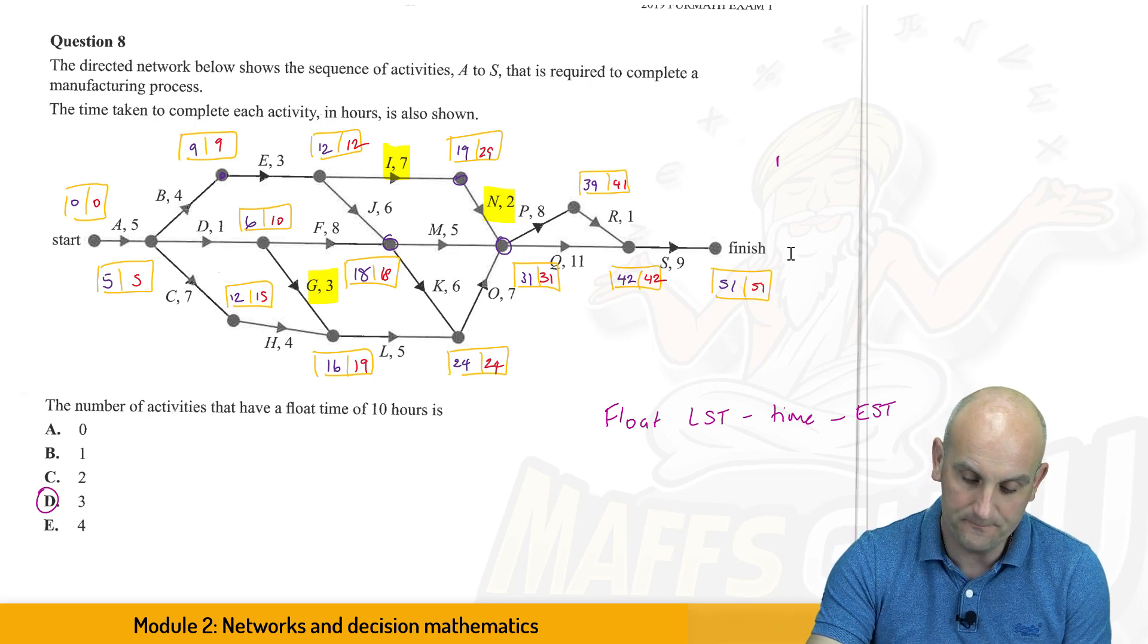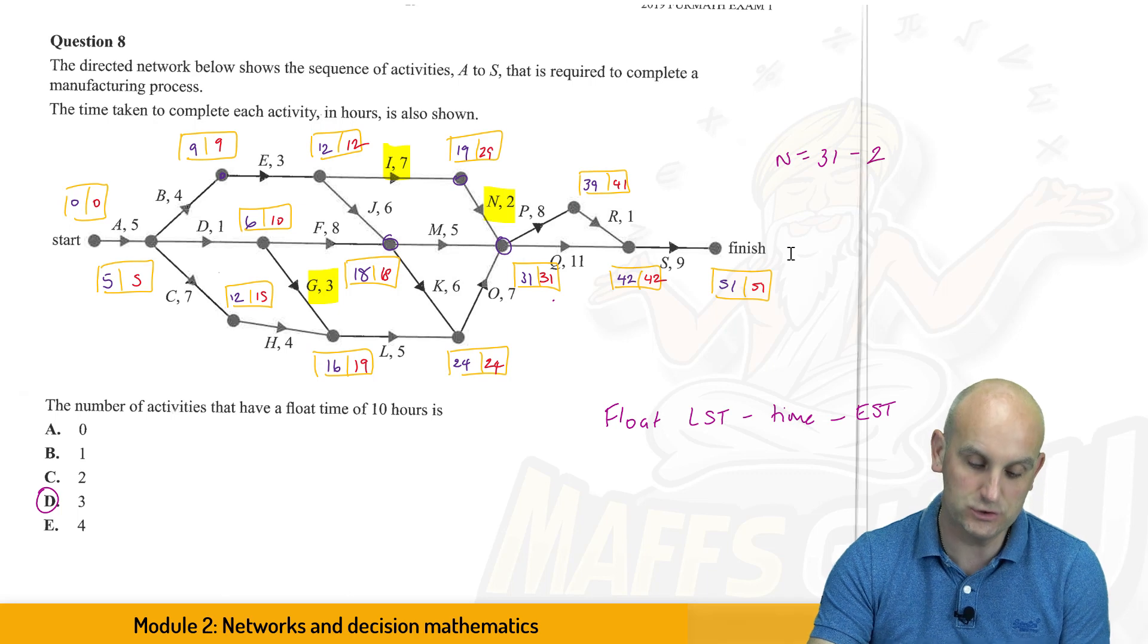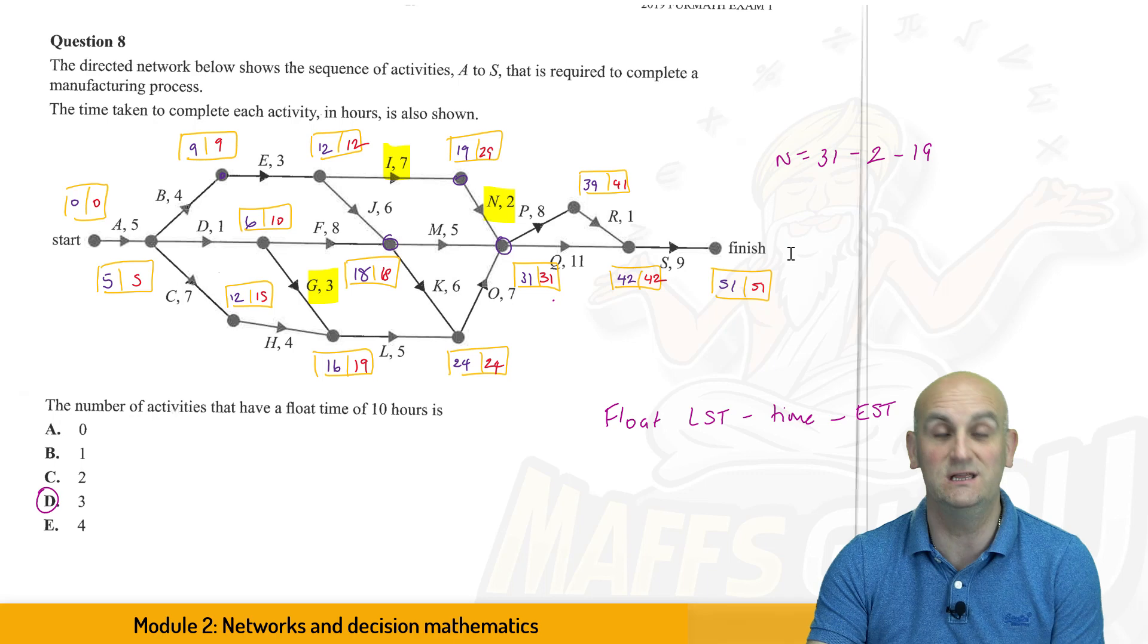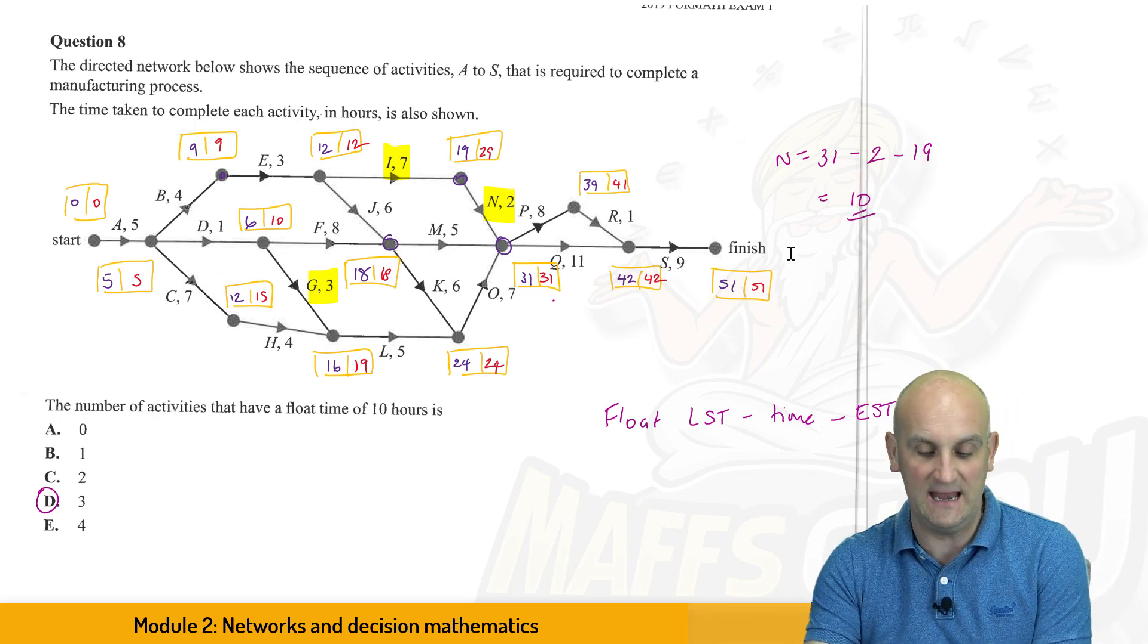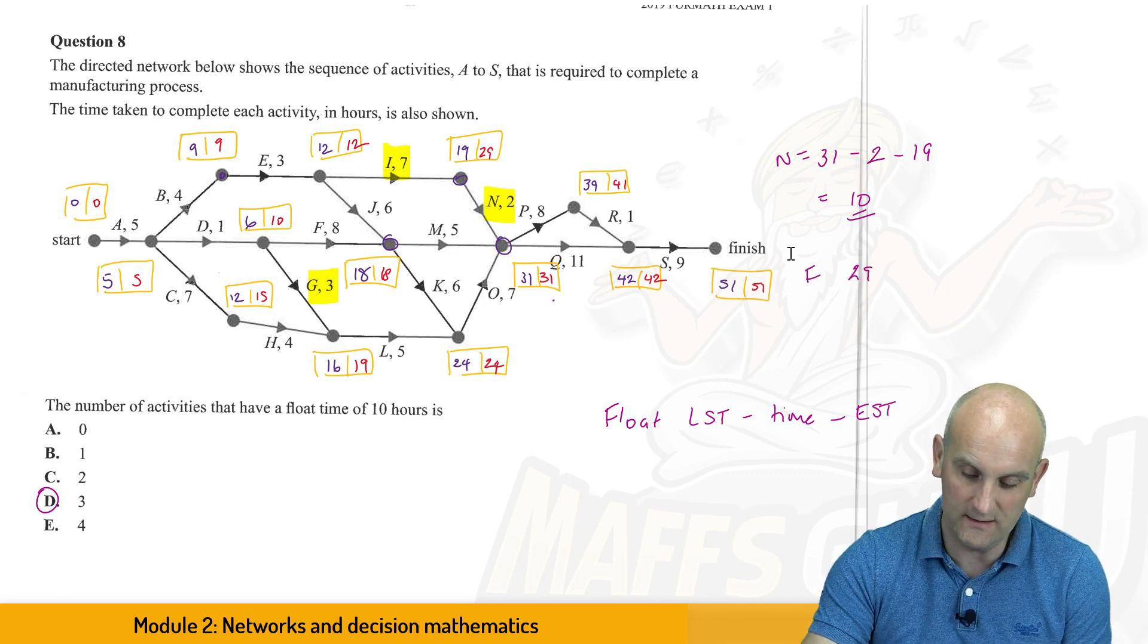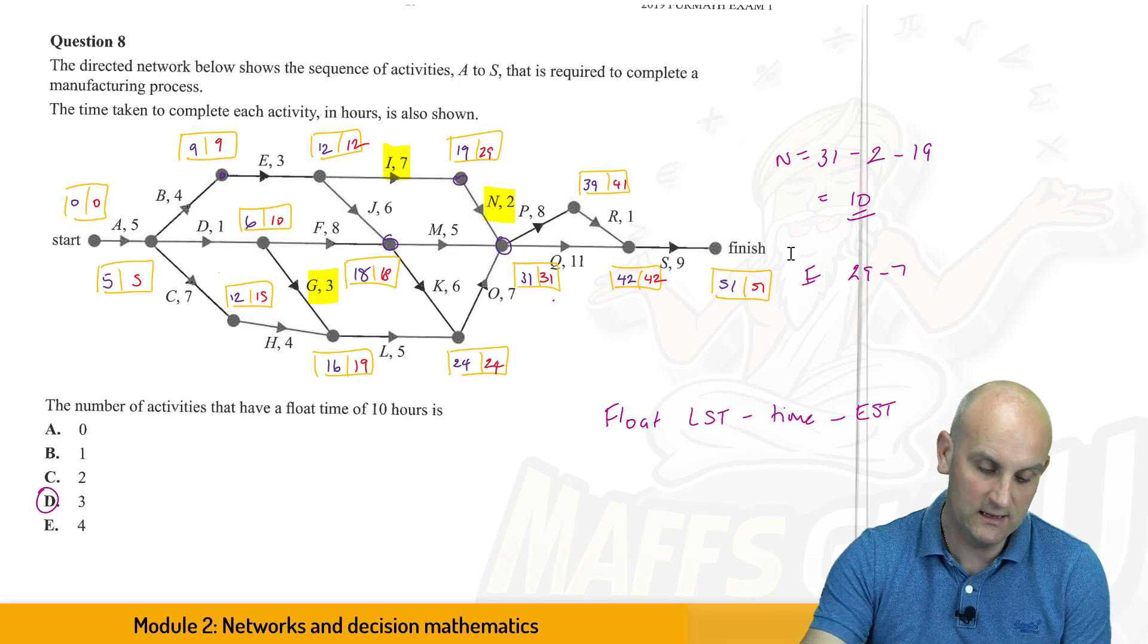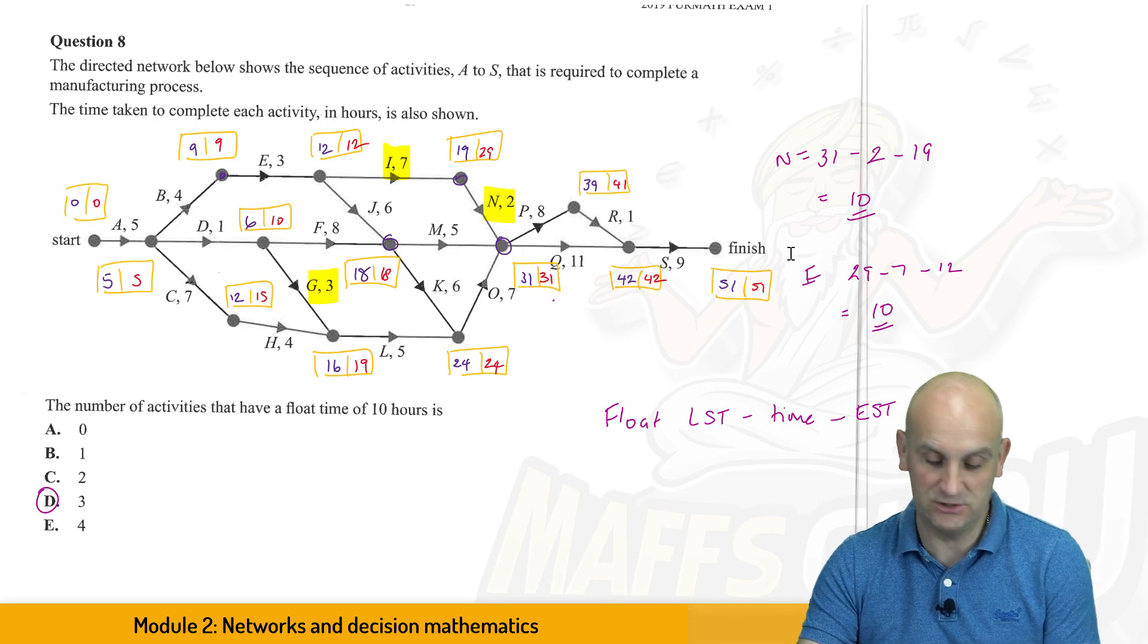So for N, we know the latest start time was 31. We know it was 2 hours in duration, and then we're going to subtract from that the 19, which is the earliest starting time, which gives me a float time of 10. So there is N. Let's just check I. So I, the latest, was 29. Subtract the 7, because that's how long it's going to take, and subtract from that the 12, which also gives me 10.